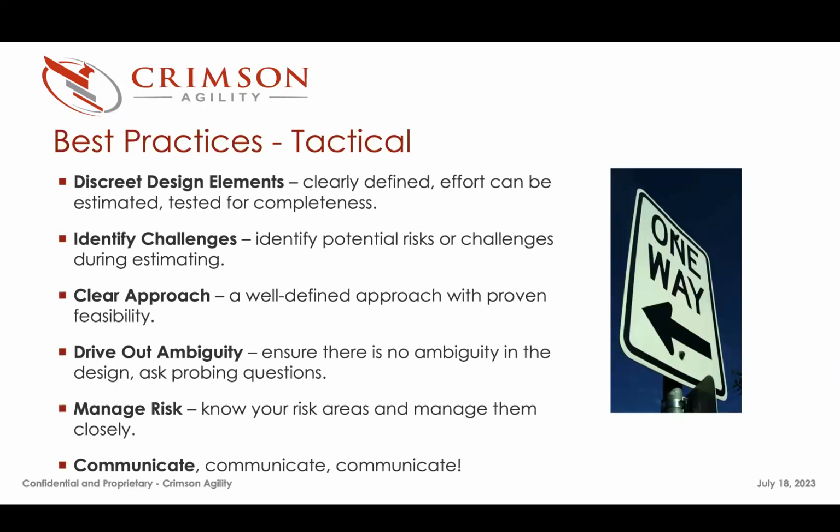Sometimes it's not possible. I've pressed Ian and Ryan on tasks that they found very difficult to estimate. And when there truly is no way to estimate it without doing it, in those cases, you buffer it. You set expectations that, hey, this is our best guess on this. There are elements of this that we just won't know until we get into it. We're telling you that now. And once we get into it, we'll let you know if we're going to need more time or if we've allocated enough time. Set their expectations that there's the possibility of change or recalibrating our estimates on a task. There's nothing wrong with that.